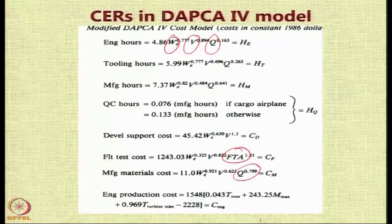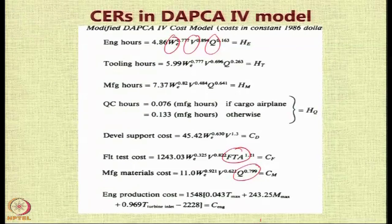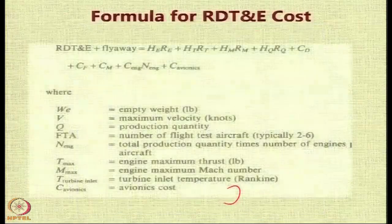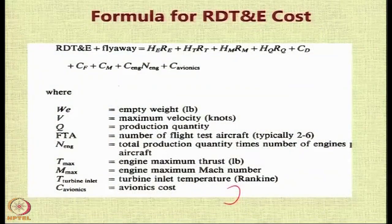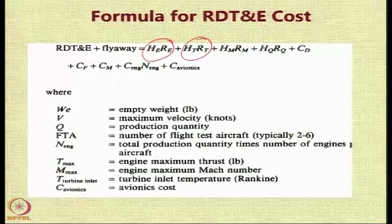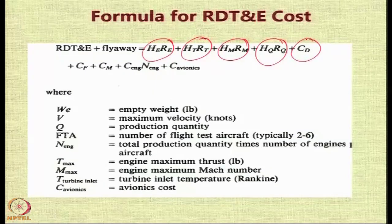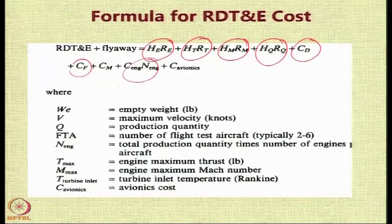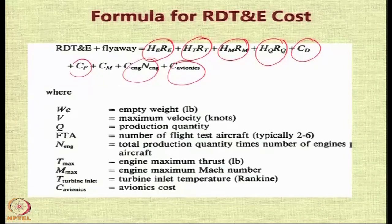The quantity of aircraft to be produced also comes into play when looking at manufacturing material cost. Looking at the combination of all parameters — engineering, tooling, manufacturing, quality control, and equipment including flight testing — along with number of engines multiplied by cost per engine, and avionics, when you add all of these together you get the RDT&E and the flyaway cost.